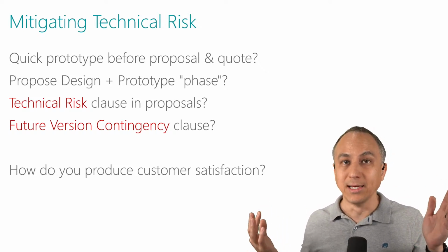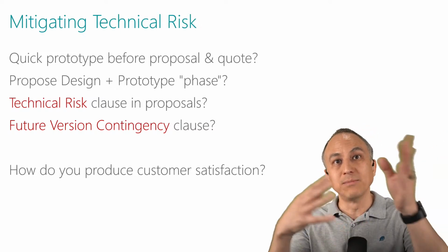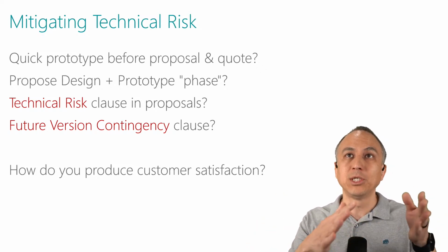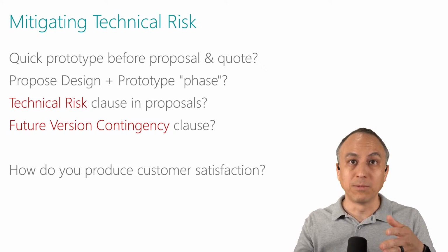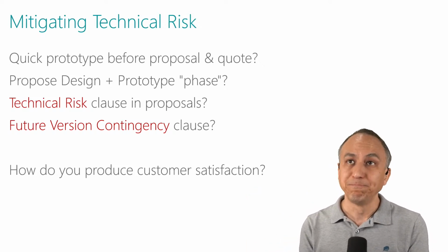Very good approach. Done it before, and it's been very helpful. And if everything goes smoothly, you have your prototypes that you then roll into the actual deliverables. Not a problem. And it helps you refine your estimate for your actual deliverable proposal or your project proposal. So that's worked well as well.